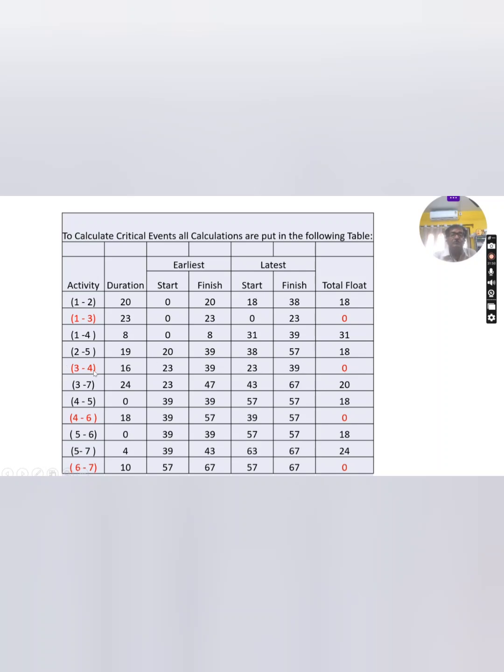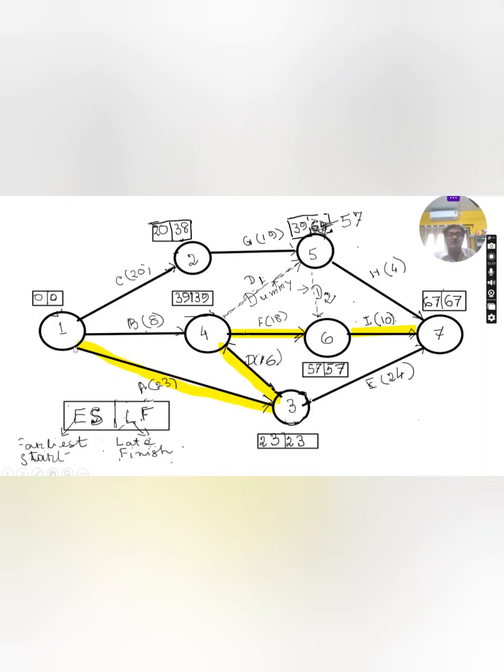The critical path is 1-3, 3-4, then 4-6, and 6-7, with no slack, highlighted with the highlighter. Maximum supervision and critical control is required for these activities. If any delay beyond the specified time is made, the project completion time will increase.